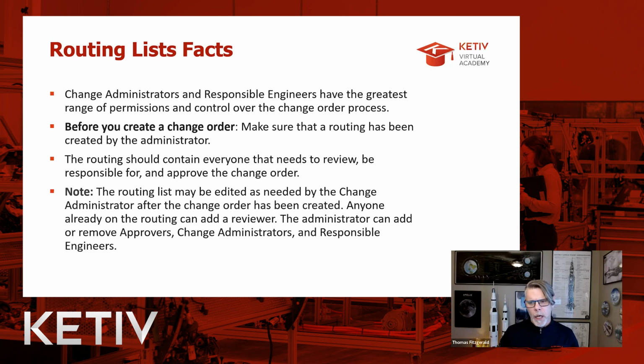Lastly here, routing lists may be edited as needed by the change administrator, okay? Even after the change order has been created. So say, for instance, you create a routing list, you create a change order, you realize that you forgot somebody, or maybe there's too many people on that routing list, you can make modifications to that even while the change order is in its process.